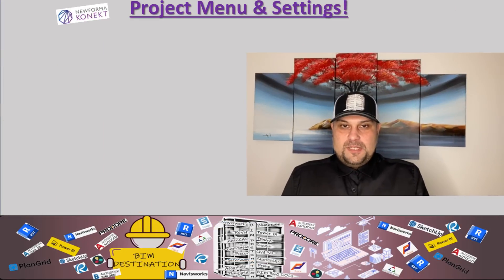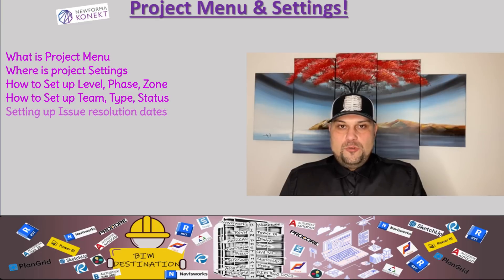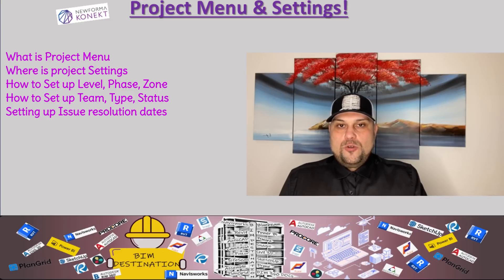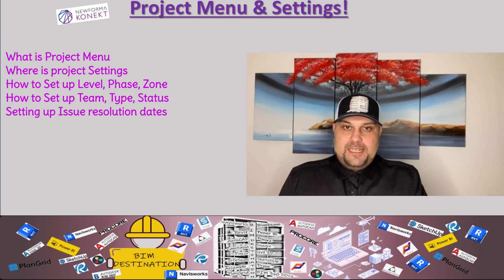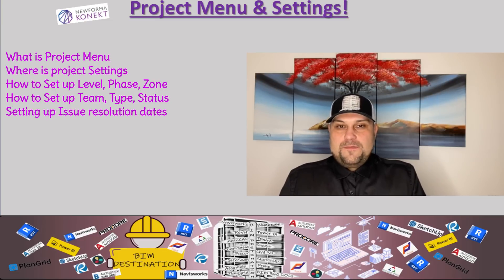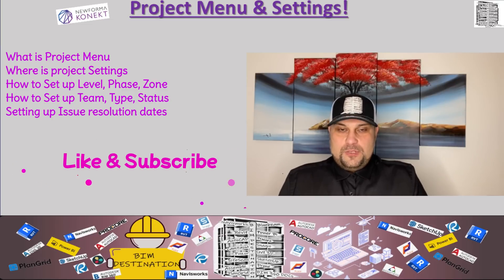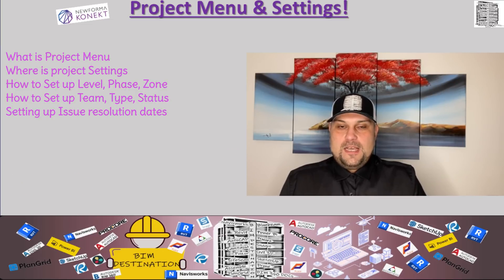Hello guys, my name is Armin. In today's episode, BIM Track New Format Connect tutorial, I want to show you how to set up your project. We do this in the web browser. I want to go through the process step by step — how to create levels, zones, phases, how to create teams, priorities for issues, and how to set the type of issues: trade, design, RFIs, and much more. This is a very important step for smooth communication between the design team, GC, and subs.